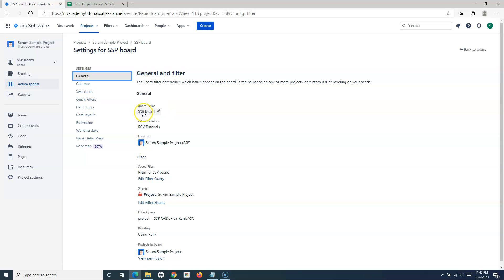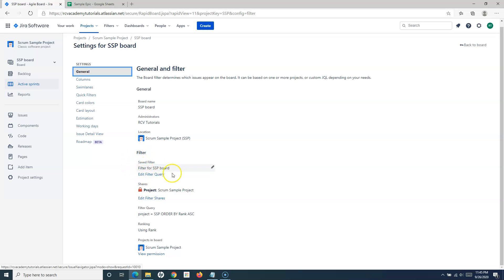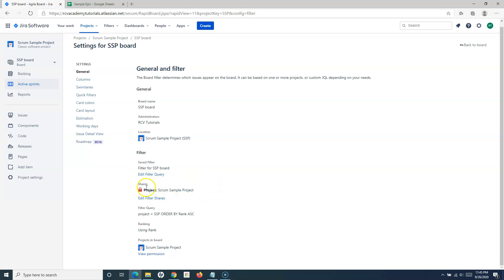The General section in board settings includes the board name, administrators, and the location — which project the board belongs to. There is also a filter setting, where you can edit the JQL filter query associated with the board. Whatever criteria you define in that query will filter the issues displayed on the board. You can also view and manage the permissions for this board.